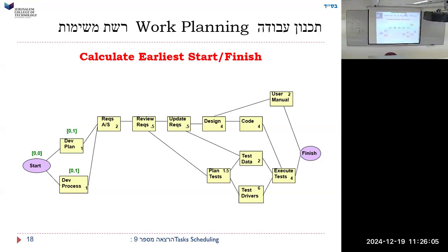Well, depends how many people we have there. If it's 100 man months, but I have 25 people, then it's only 4 months. So we're just taking that number. That's what I'm saying, it really shouldn't be effort, it should be duration.